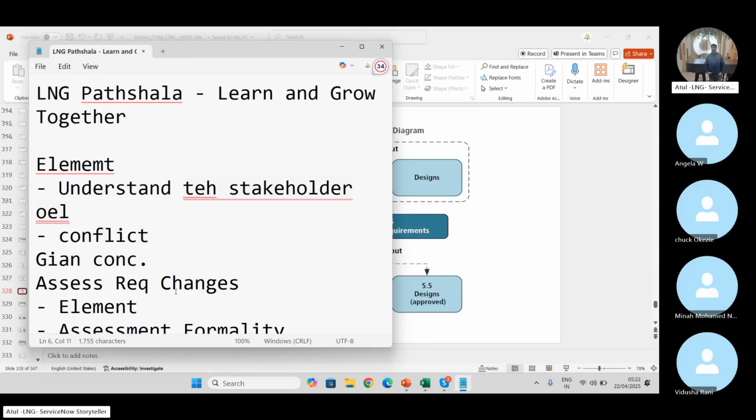An important point: when you send the approval and you have a conflict, please make sure you note down each and everything. What has been changed? Why has it been changed? Who requested this change and who is giving the approval for this change? Maybe you added 2 stories of incident management, and when it comes to the approval phase, the 2 stories are out from the sprint. Then you have to write the statements carefully in the story itself.